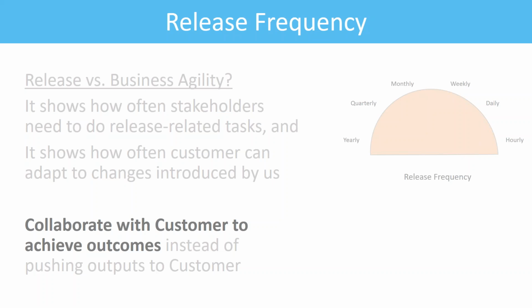So we need to indicate what the expectation from the customer is, once again, in order to know if we're satisfying them, under-servicing them, or over-servicing them. Then how come stakeholders are here? Because sometimes release is not only about your service. You might need to coordinate a lot of different people to satisfy a customer's request, or better yet, to release a customer's request. So if you have a frequency going on, let's say it's at the end of every month, then your stakeholder would know, okay, this service is going to ask you to help by the 20th or by the 30th of each month, and then we just have to help them out.